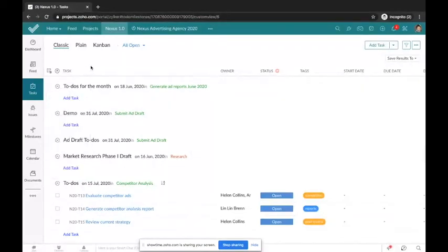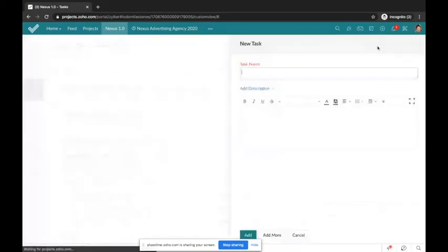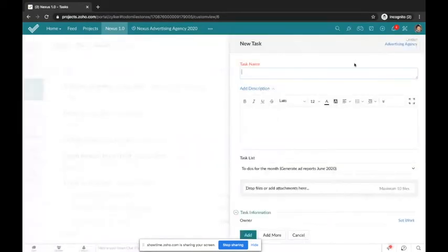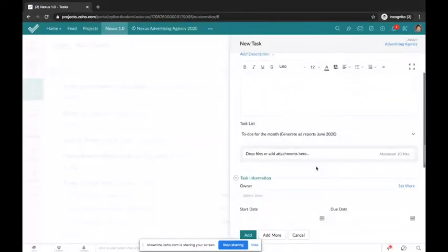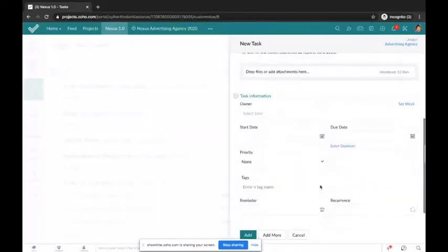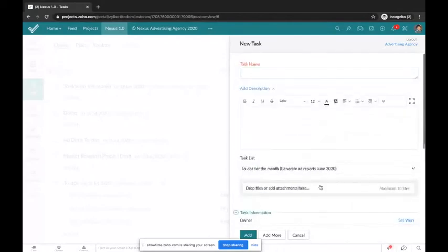So now it is time to create your first task. So we have completed the last but one phase of today's workshop. This is where you go and add your first task, right? Just like you needed only the project's name as a mandatory field to create a project, this is the place where you just need the task's name. We do not enforce any other fields. So a task can just stay unscheduled without any owner and just sit in your project.